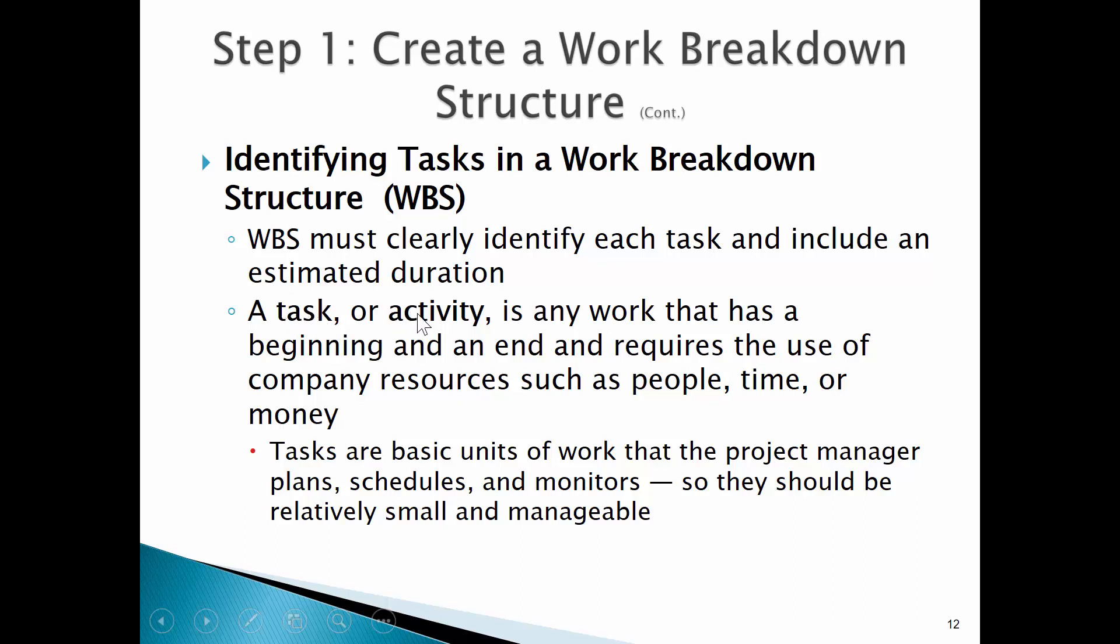We identify tasks in a work breakdown structure, WDS. It must clearly identify each task, include the estimated duration, a start date, an end date, or a start day, an end day. What is the task, a description of the task. We give it a task ID. Keep that in mind, especially as we deal with complex projects.